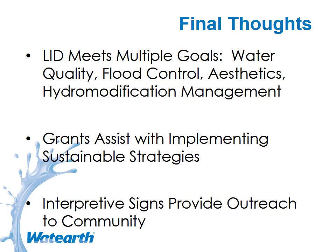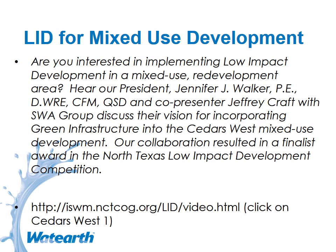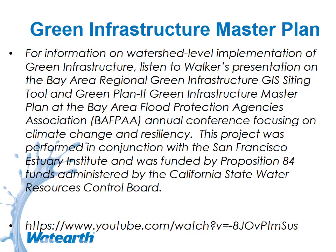The initial bids came in higher than what they had funds allocated for, even with the grant funding. So we went back through a value engineering process, and they rebid it, got a slightly lower bid, but the issue was, we lost a little bit of a factor of safety that had been built in. They did end up going with the lower bid on it through the value engineering process, but in my mind, I don't think that the value was there for the safety factor that was lost. It still performs fine, but we don't have excess capacity per se.